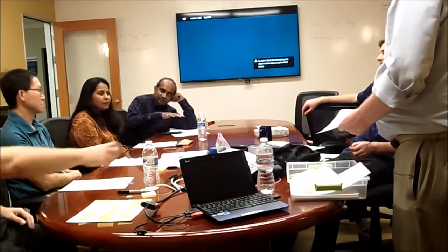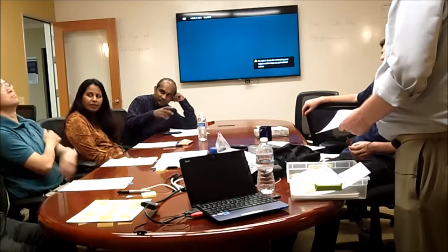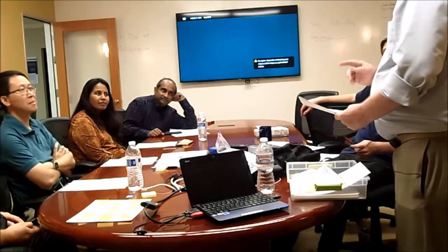So how many would you expect to have done? 12 or less. No, because it's not sequential, there's an overlap, so it's only 6 seconds. Because of the bottleneck. Okay. So every 6 seconds, there should be units that come through. Those calculations are easier to do when the system becomes stable, that is, everybody's populated with work. There's extra time that nothing is apparently getting done. It's not coming out the end until everybody's got some work to do, and so on and so forth.